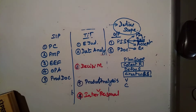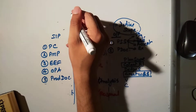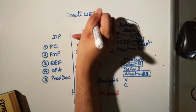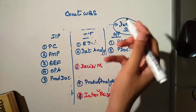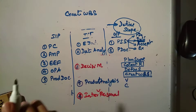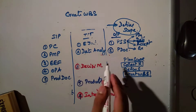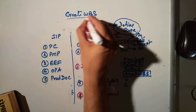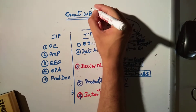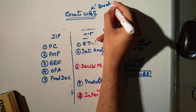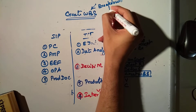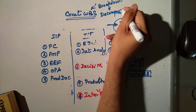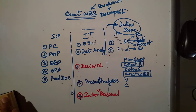Welcome back. In this class I'm going to teach you something called Create WBS — inputs, tools, and techniques, outputs. In the last class we learned define scope, project charter, and related inputs. In Create WBS, WBS stands for Work Breakdown Structure. Breaking down is also called decomposition, so one tool and technique should be decomposition.